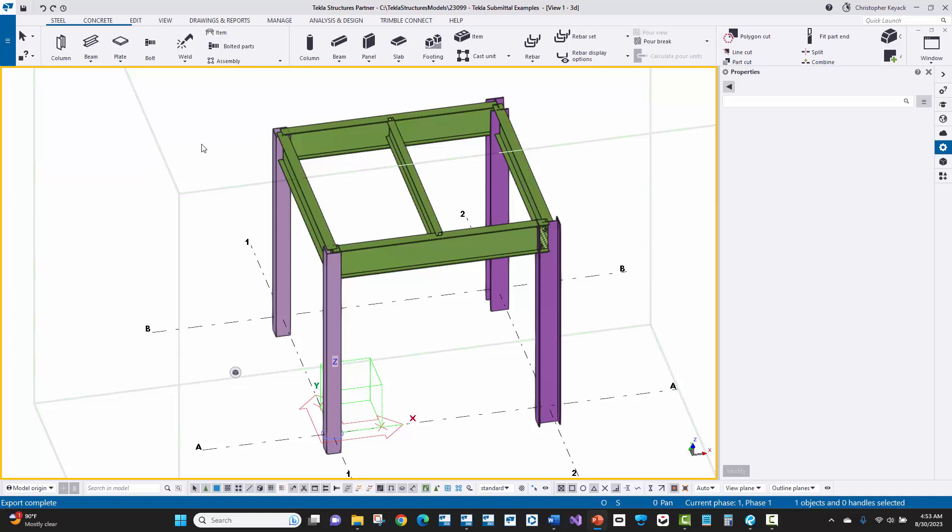In this video we're going to showcase how to publish your models to Trimble Connect from Tecla Structures. You're going to want to publish your model or export your models and put them on Trimble Connect at each major submittal point in detailing. You also may get a request from the fabricator to publish the model more periodically, especially at early phases of detailing and modeling for progress reviews so they can review the model and see how things are going. Coordinate with the fabricator on the frequency required, but definitely as a minimum you should export a copy at each major submittal point such as ABM, issue for approval, or issue for fabrication.